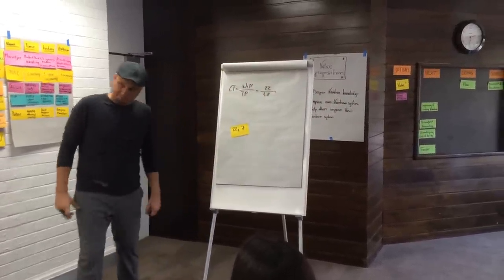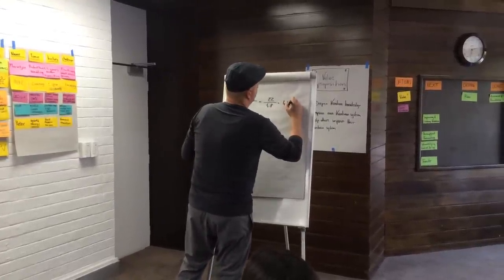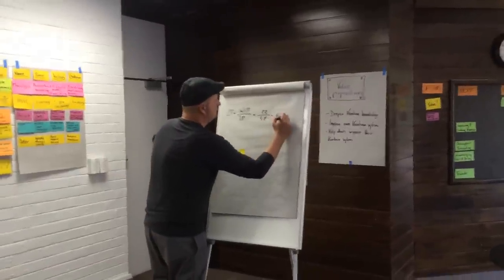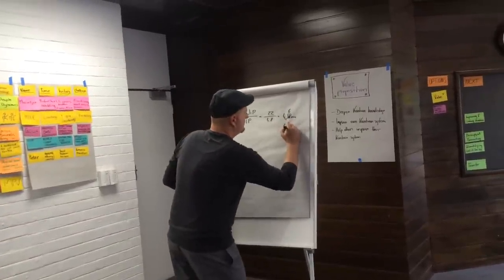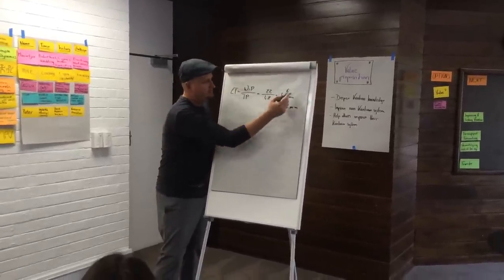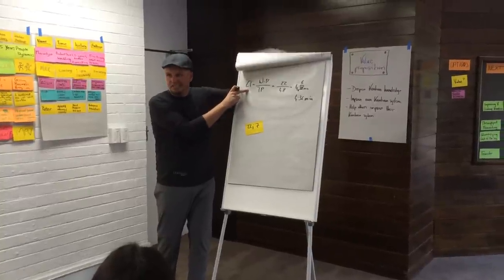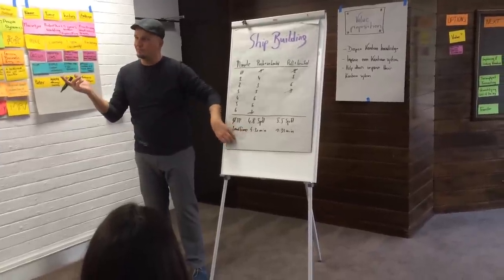22 divided by 4.8. 4.58 minutes. Let's say 4.6. We have to normalize it to 60, so it's roughly 4:30 is the lead time, right? I hope it's right. 4:30. There we go. Okay. So that's Little's Law, right?